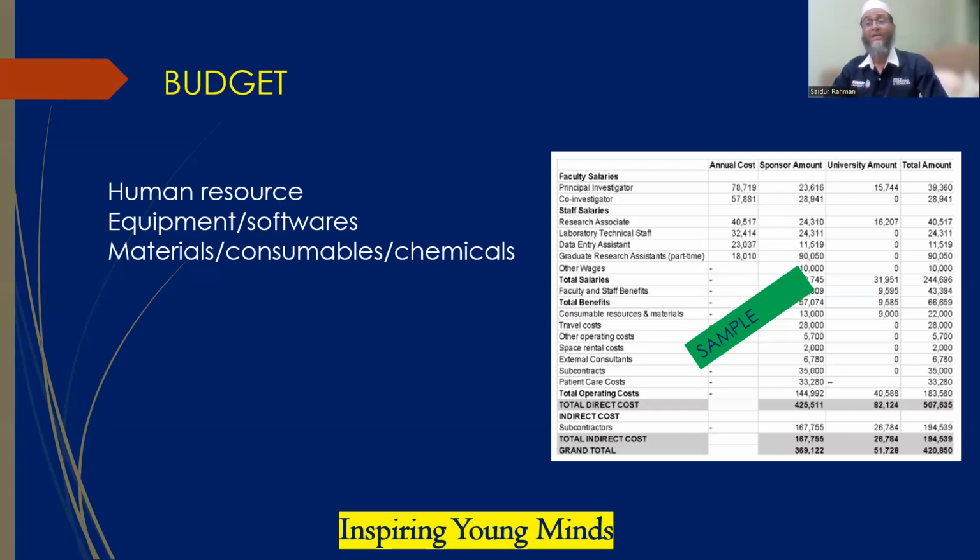Equipment and software are a major share of the budget. For major, big funding, normally 40% of the allocation goes to equipment and software. Without good quality, strong equipment, you cannot generate good quality data. These are the lifeblood to generate good quality data, and to validate and verify our ideas. So small equipment, major equipment, high-end equipment are basically needed.